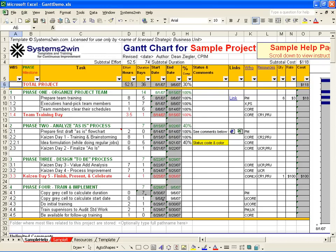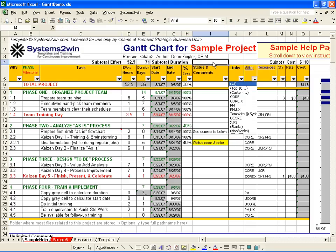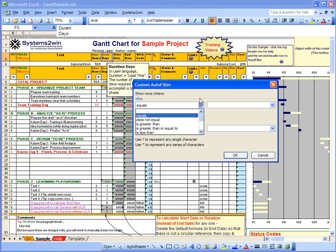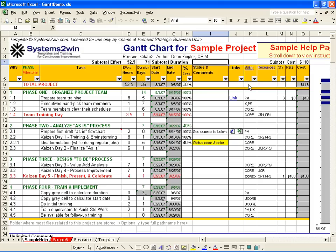At the top you can see subtotal effort and subtotal duration, which show totals for the entire project. Those little drop-down arrows on each column heading let us filter our data. For example, we can filter to see the effort for just our project manager, or filter for the top 10, for blanks, or for non-blanks. We can also use the custom filter for more sophisticated filtering with AND/OR statements and Boolean operators like equals, begins with, or does not contain. Or we can select all and see everything again.